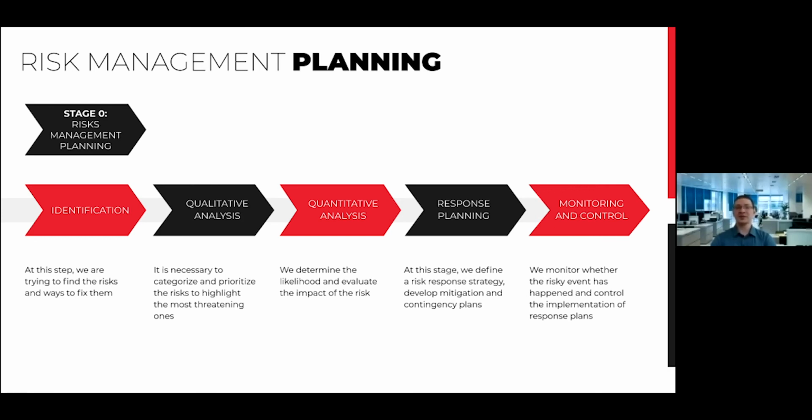After it, we can start the identification process. We should try to identify as many risks as we can before start of development, but this step should not be finished until the project ends.